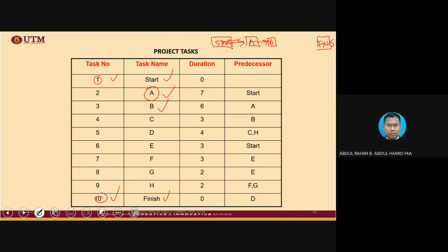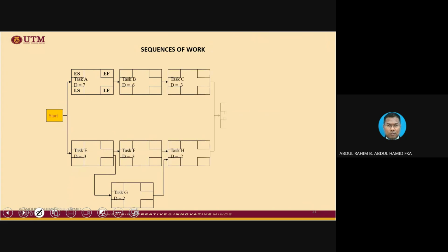Okay, because you must remember, or you must distinguish between an arrow diagram and an AON or PDM diagram. In an arrow diagram, the arrow itself represents an activity, whereas in AON or PDM, the arrow simply represents a relationship. So once you connect one activity with another, that's it. You fulfill the relationship already. So forget about the arrows being crisscrossed. Later on, we do have an example of arrows that crisscross, for instance.